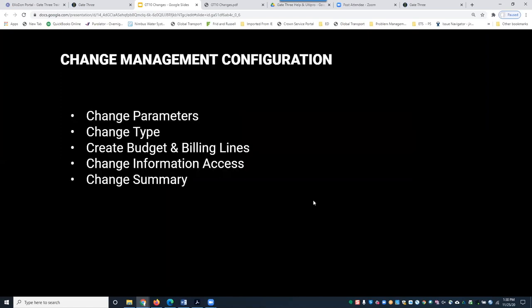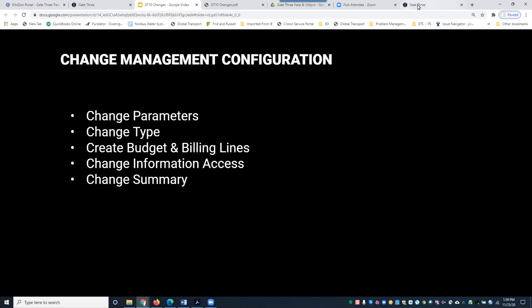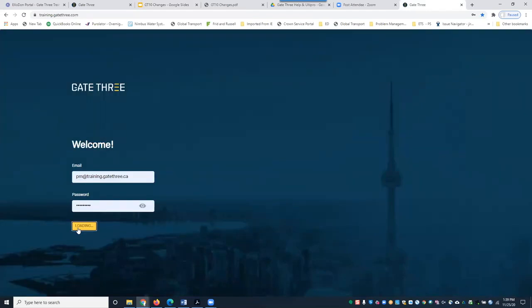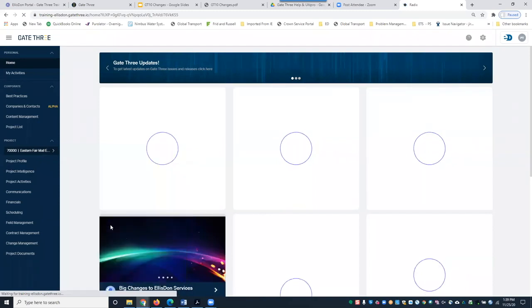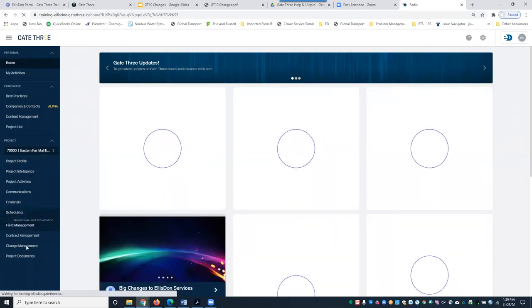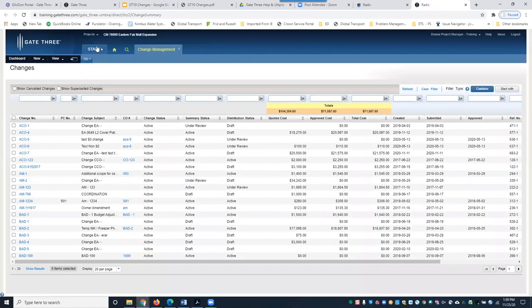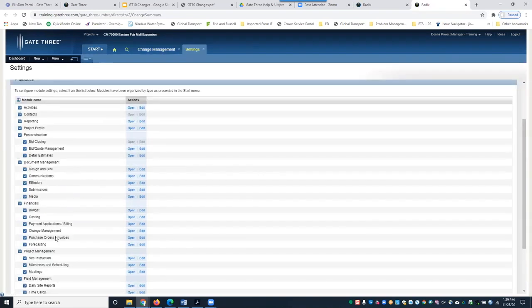We're going to go into the change settings — change parameters, change type, budget and billing lines, change information access, and change summary. This is usually done at the start of the project; one of our consultants will typically sit down with the PM of record and configure the settings. I'm going to log in as a PM in the training environment and access my project, Eastern Fair, then navigate to change management, which takes me to the Gate 3 old user interface. To access the settings, I'll go to Start > Administration Settings > Change Management.